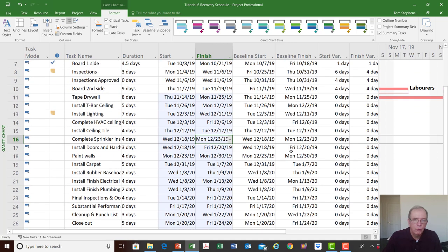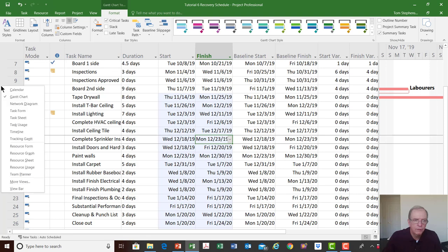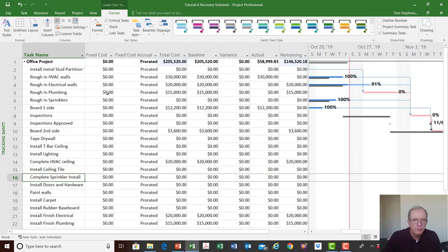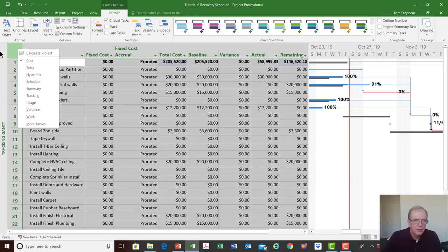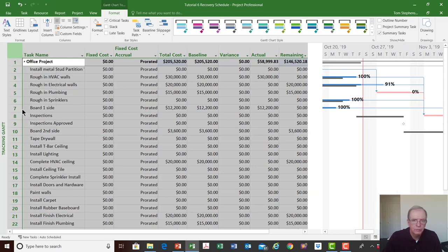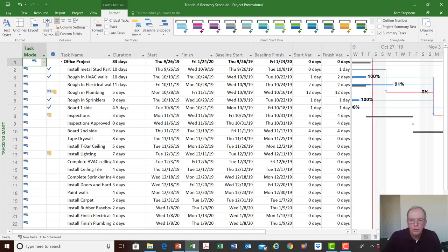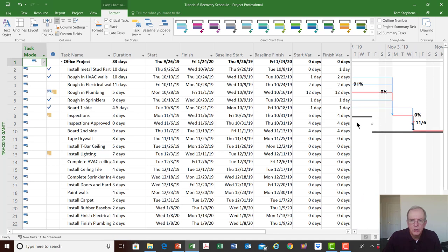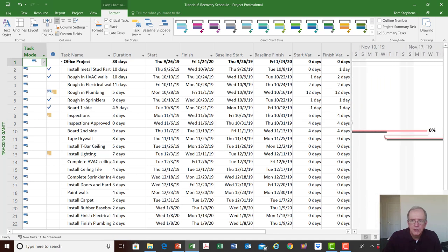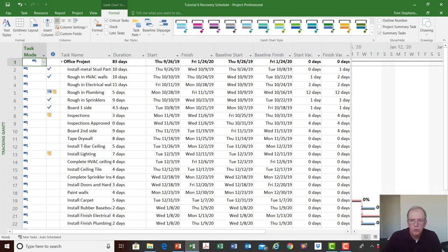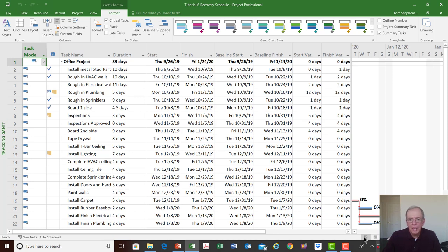With that change, my project is now back on track. Switching to the tracking Gantt variance screen — knowing what screen you're in is very helpful — we can see zero days finish variance at the end. We can follow the bars closing in: from six days difference, to four days after shortening inspections, and now zero duration variance. Following all the way along, the bars line up and we're back on track through the whole project.